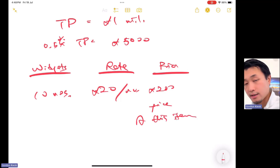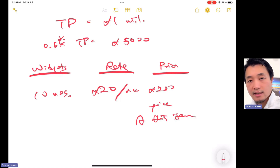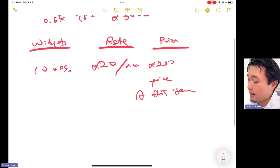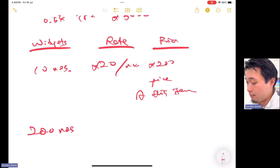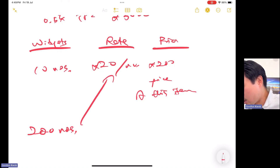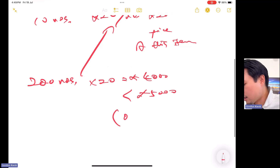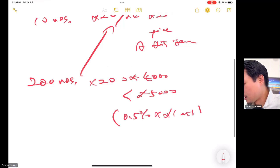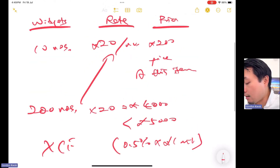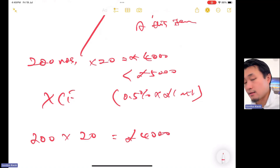Now suppose instead of 10 units we have 200 units. Is that a compensation event? Test it: 200 × £20 = £4,000. £4,000 is less than £5,000, which is 0.5% of the £1 million tender price. Therefore this is not a compensation event. How do we pay the contractor? We remeasure from 10 to 200 using the same BQ rate and pay the contractor £4,000, which goes into the payment certificate.